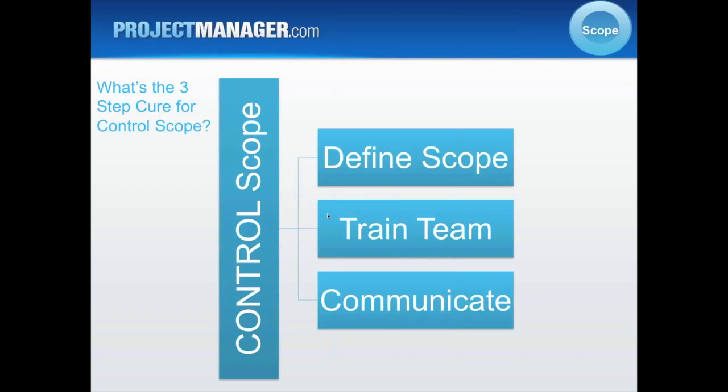Okay, good catch, because that was on one of the first screens. So it is important to distinguish the difference between the product scope and project scope. So the product scope is talking about the features and the functionality that characterize the product, the service, or result, whatever you're delivering from the project. So again, the features and functionality of the product, service, or result.